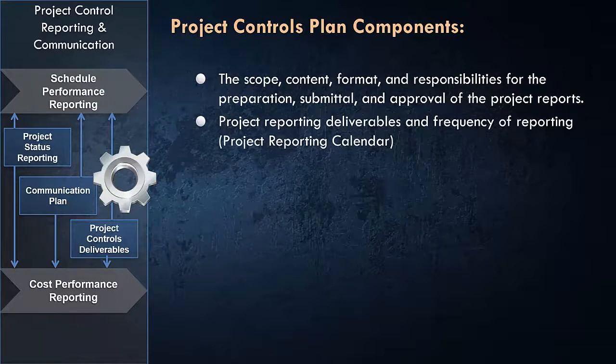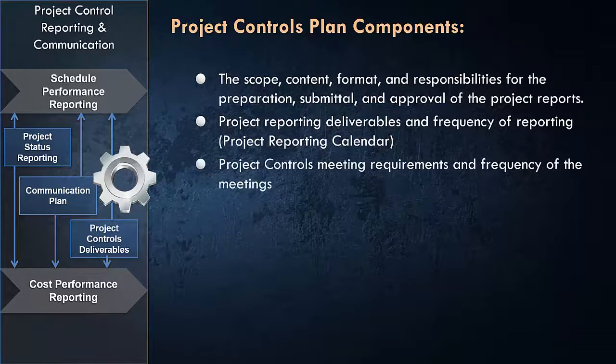What I found is very useful is developing a project reporting calendar and including that as part of your project control plan. It's basically reflecting the project control deliverables or reports on a calendar so that everybody is clear on the expectations in terms of delivery of the specific report or document and at what time or at what frequency. So developing a project reporting calendar is very useful, and it's good to include that as part of a project controls plan.